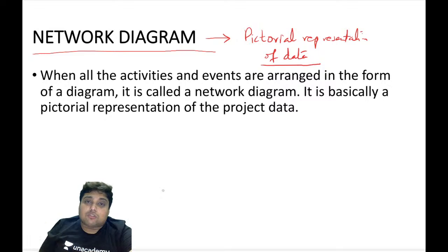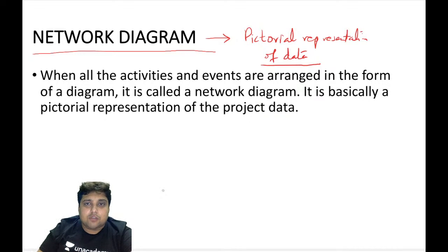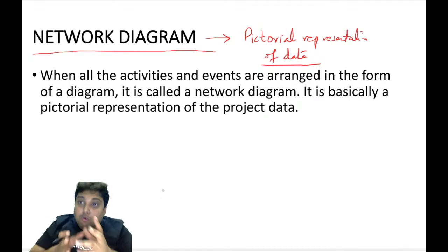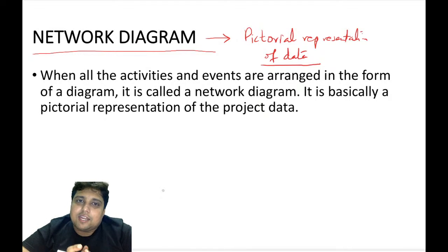Suppose there is a house construction project and there are different activities, like you have to purchase the land, you have to get the land registered, you have to perform the land warming ceremony, then you have to do the foundation part, then you have to do the brickwork, then columns, then slab, then plaster, then paint, then at the end you will do the house warming, that is Grih Pravesh ceremony and puja and everything, and then you will start residing in the house.